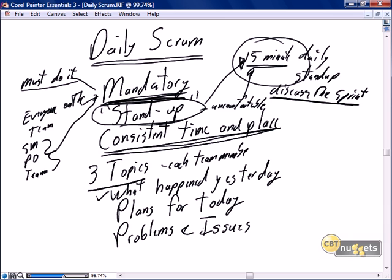What did they do yesterday? For example, 'I worked on story number 15 and I was able to complete the development.' What are you going to do today? 'I'm planning to do the testing on user story 15 for the first three hours, then I will go to the storyboard and pick the next story scheduled for completion in this sprint.' And we want each team member to tell us any problems and issues. That's it — status and facts.